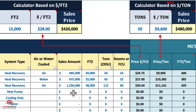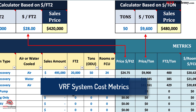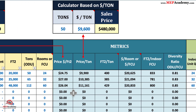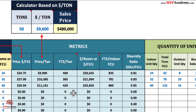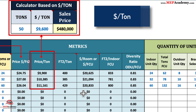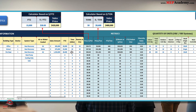Here's what it includes. 1. Comprehensive cost metrics. Cost per ton: know the total cost of your system based on the refrigeration capacity in tons. Cost per ton is a common way of quickly budgeting VRF systems. By tracking all your VRF projects, you'll have an easy reference for quick budgets.